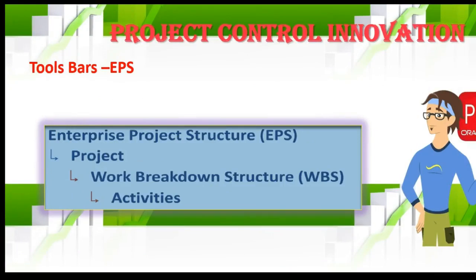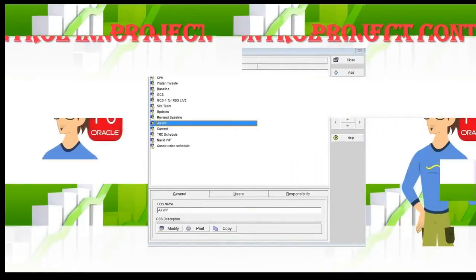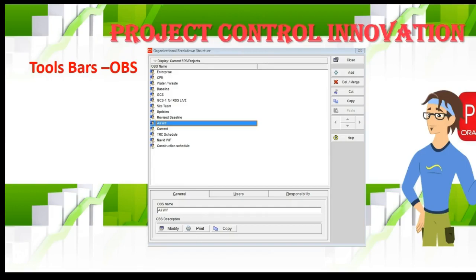The EPS (Enterprise Project Structure) is the highest level in the company. Under that you'll find all the projects, and under that the WBS (Work Breakdown Structure), and under the WBS all your activities. The OBS (Organization Breakdown Structure) is your company's staffing plan. We add all resources there so you can assign responsibilities — for example, assigning each project manager accountability for a specific project.